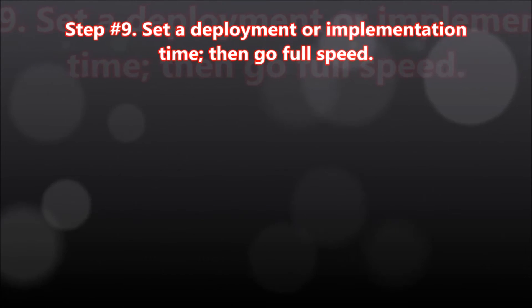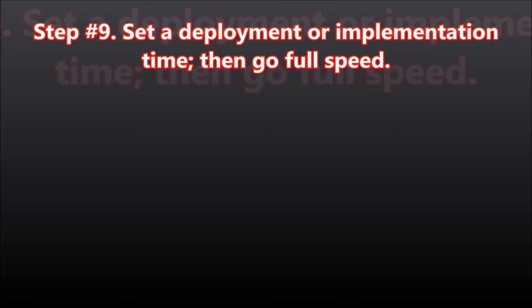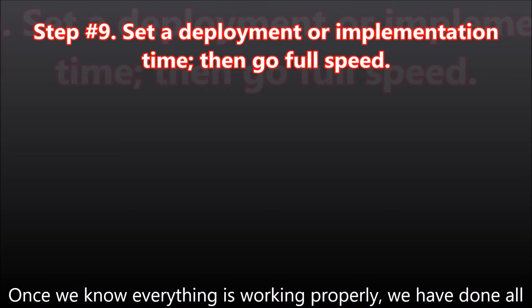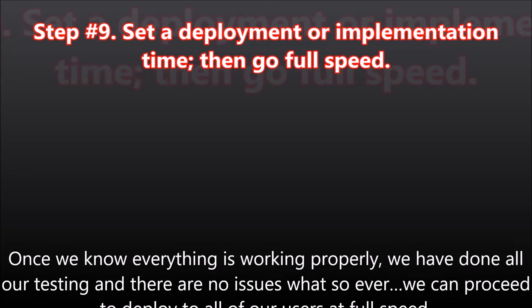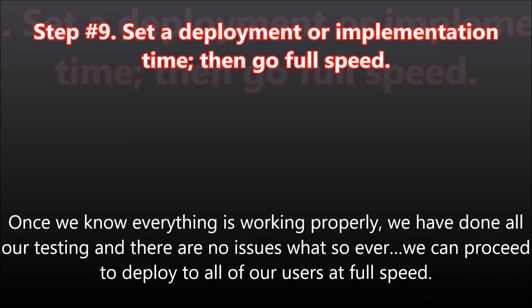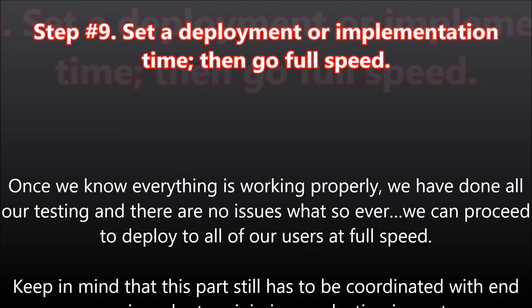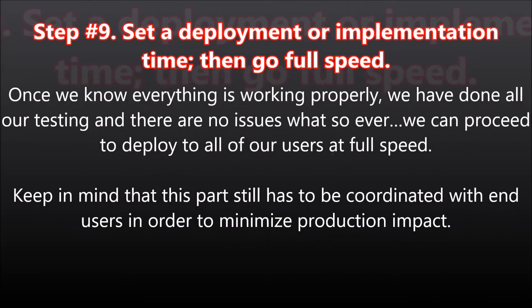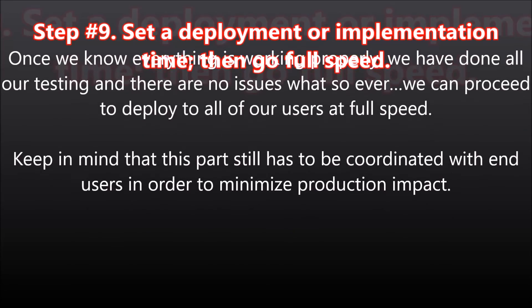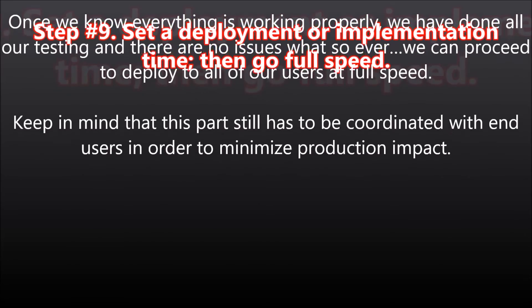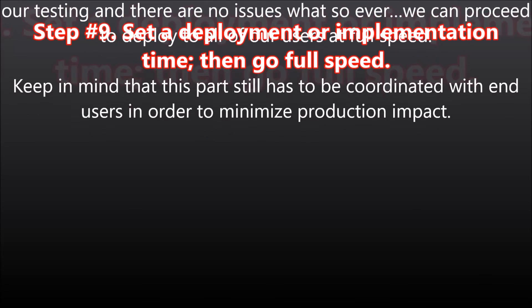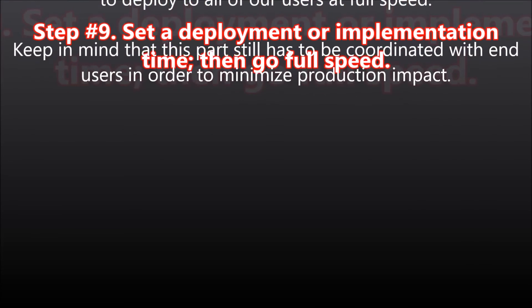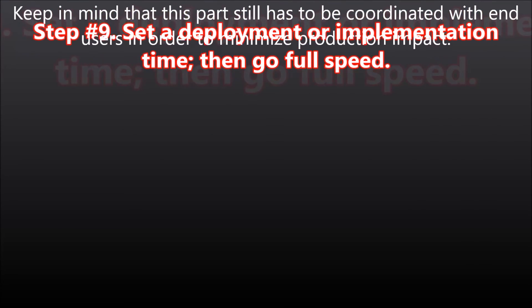Step number nine: set a deployment or implementation time, then go full speed. Once we know everything is working properly — we have done all our testing and there are no issues whatsoever — we can proceed to deploy to all our users at full speed. Keep in mind that this part still has to be coordinated with end users in order to minimize production impact.